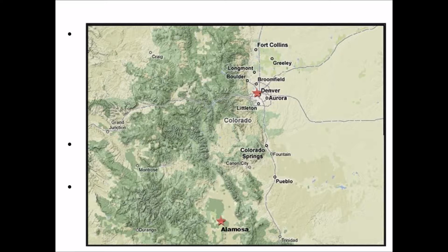One is that they focus on target capability lists, which really are, in many cases, capacities rather than capabilities. I'll say more about the distinction between those two things in a moment. They basically often look at one TCL or observation at a time and assume that the plan applies to the situation. Like, for instance, in H1N1, they assumed that the vaccine would be available all at once and the demand for it would be high, neither of which were true, as everyone now knows, in the fall of 2009.